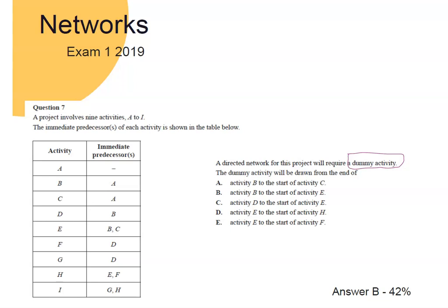And so where you've got A reoccurring here, that's okay, because that is paired. So A is on its own as one predecessor, and it appears again on its own as a predecessor. We can see the same for D. D appears in two things, but it's just D on its own. It's matching there. Whereas here, we've got activity B on its own as a predecessor for activity D, but then B and C as predecessors for activity E. So where I've got this mismatch occurring, I know that that's telling me I need a dummy edge, okay?